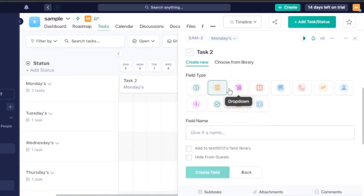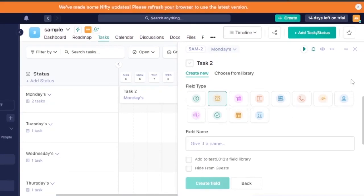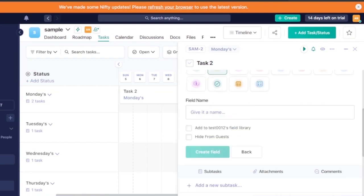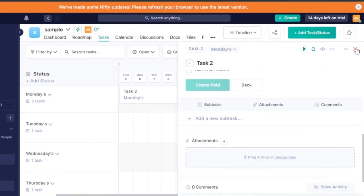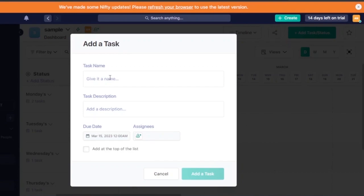If you need custom fields, you can add them inside the task — options include dropdown, number, URL, phone, email, or location. If it's a physical task, you can even add a location. You can create a new task or add new custom fields as needed. To add a new task, click 'Add a Task' and fill in the task name, description, due date, and assignees, then click 'Add Task.'